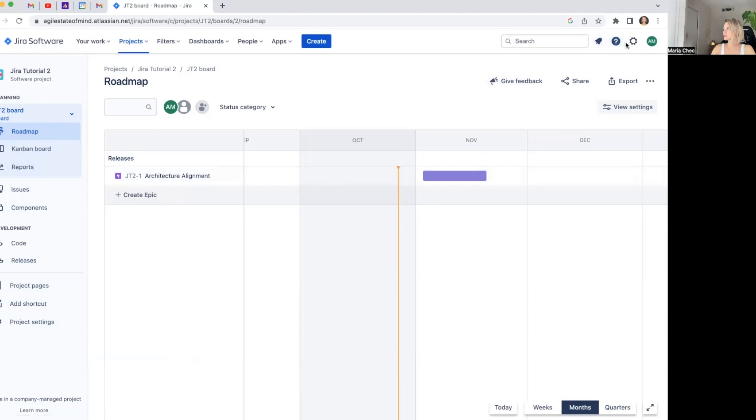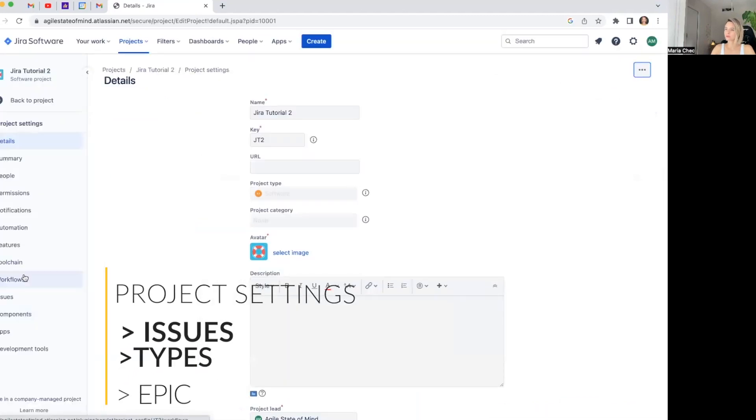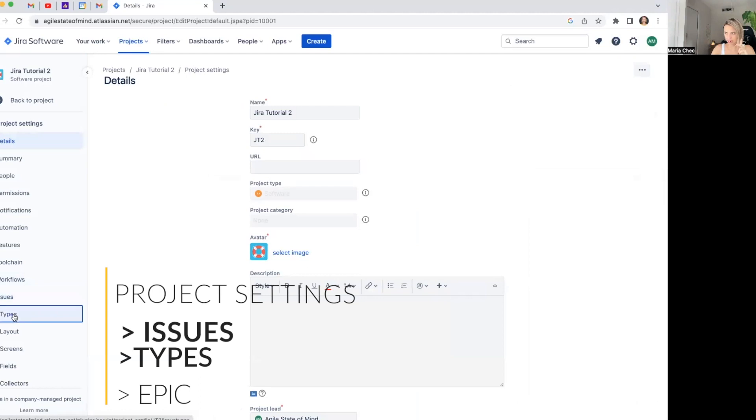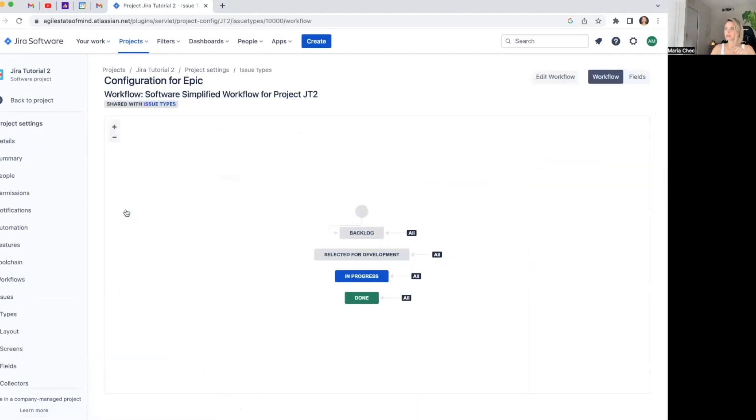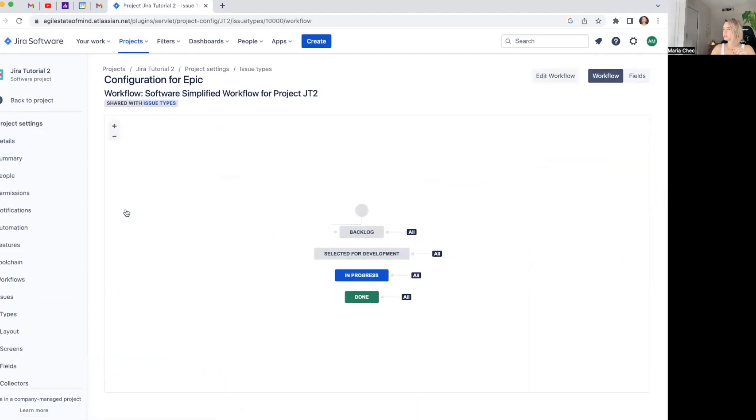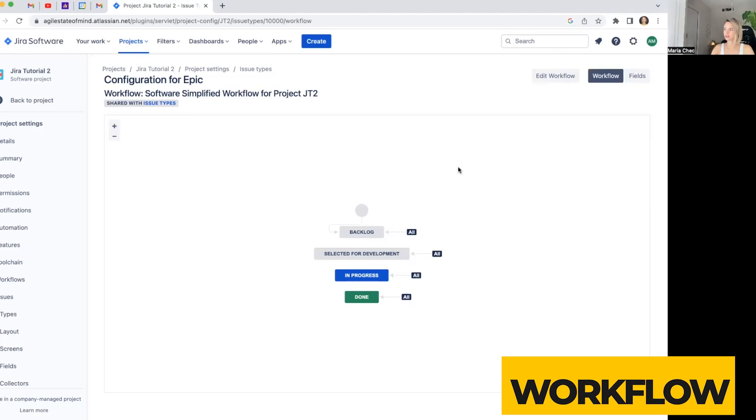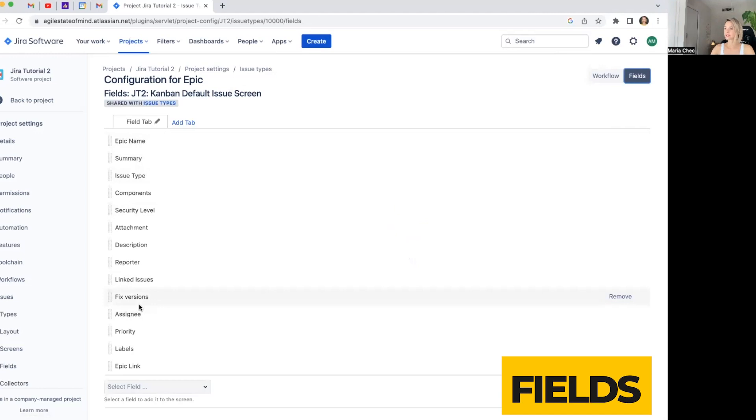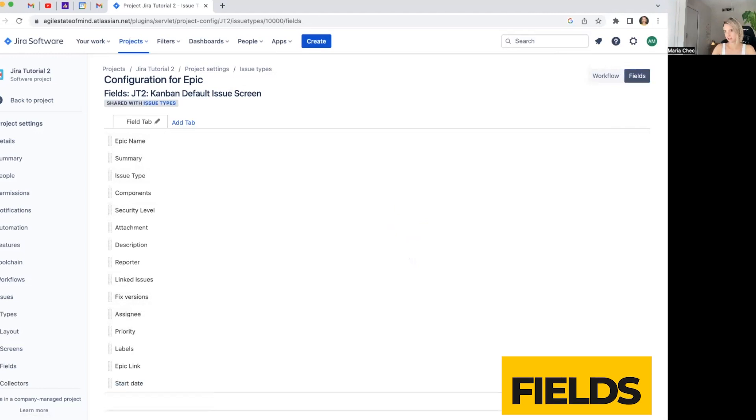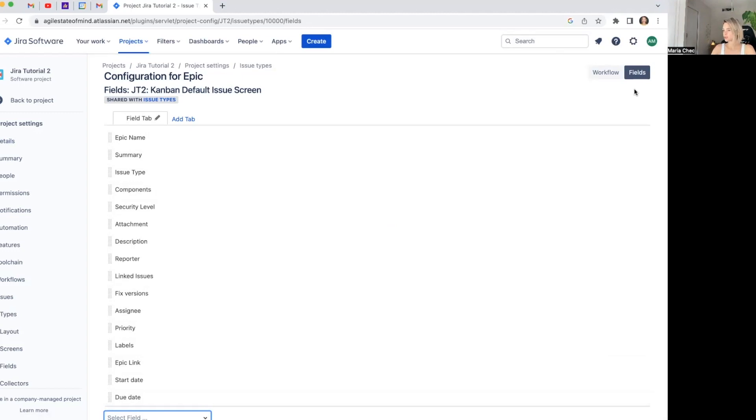I already said we have two settings in Jira. We have settings here and we have settings of the project. So I want to go to the project settings and here I already know the path. I need to go to types epic and here is not what I hoped for workflow. Okay. So we have, we can edit the workflow. So this is the workflow that we currently have. I'm okay with it. I don't care. And here we have the field. So this is important if you want to show the start date and due date. And this way it will be easier to make sure where we want to see this Gantt chart. So start date and due date.